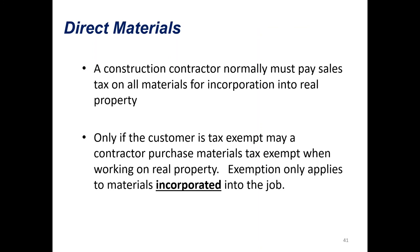Next, let's quickly talk about the taxability of materials. A construction contractor normally must pay sales tax on all materials incorporated into real property. Only if the customer is tax-exempt may the contractor purchase materials tax-exempt when working on real property. The exemption applies only to materials incorporated into the job—the exemption doesn't apply to consumables; it only applies to items like lumber, nails, two-by-fours—anything that's going to be transferred to the contractee at the end of the job.